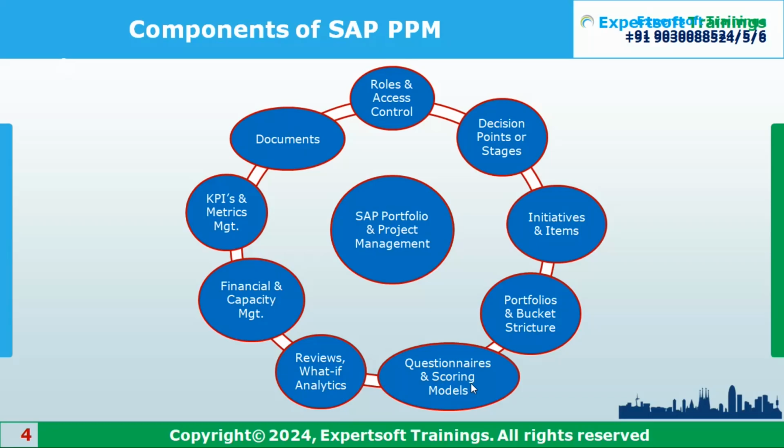So what exactly is the what-if analysis? Suppose you are a PM and I am also a PM. I have done some planning and submitted it to the stakeholders. Some other PM can raise queries. Instead of changing my plans, I create a new version for you, and you can do your financial planning over there. Later we submit both plans to the stakeholders. Whichever plan is approved will be used to create the operational project. That is a what-if analysis.